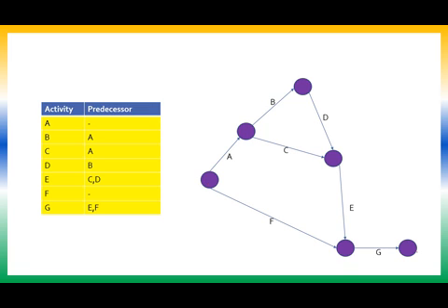Correct? Now what next? Node numbering. Which will be node number 1? Obviously, without any doubt, this is node number 1. So delete the lines from here. Which will be the second start event? So this one. That will get node number 2. Now delete the lines from 2, which becomes 3. So obviously this becomes node number 3.